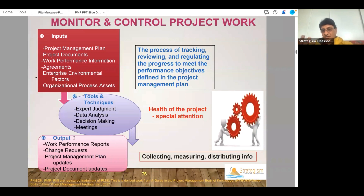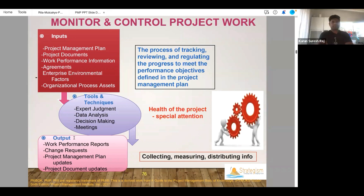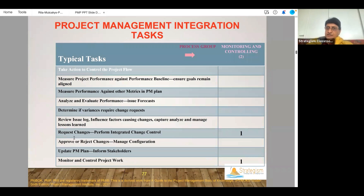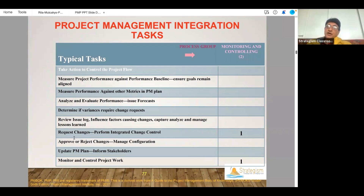Where do we stand right now? Is everything going good? What does the report say? Reports say that we are on track — the project is on time, it is on budget. However, these three requirements we don't really understand well; there's more work required. We need some more money and funding for that, so let's make a change request to the stakeholders. This is where the flow of work and action items are done: performance is assessed against the plan, evaluation happens, forecasts are made, change requests are made, issues are surfaced, changes are approved — the request is made and approval will happen in the next process — and the plans are updated.